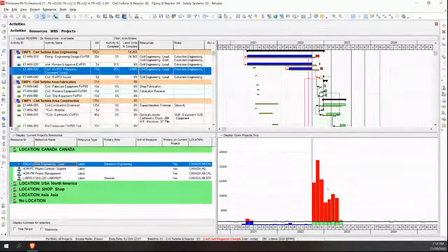So this is how you're going to know, and P6 highlights it for you, which is fantastic, and it can also help you deal with them, okay? So that's a bit more of an advanced topic, but it does have some capabilities in there for you to put priorities and for it to try and help you rearrange the work, okay? Now, rearranging the work would hopefully not bump it into critical path, into those red bars that we showed you earlier, right? Because that is going to be pushing your timeline out, okay?